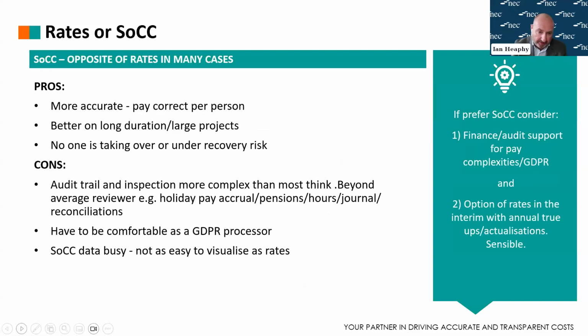I think that's some really great points there, Darren. I also agree that using a schedule of rates does seem quite easy, but actually you then put a lot of rules around it over what hours are chargeable. As you say, do they get paid overtime? Do they not get paid overtime? Do they get time in lieu? There can be a whole range of complications that you have to add in an entire rule book around it, which actually then detracts from the concept of it being a simple solution.